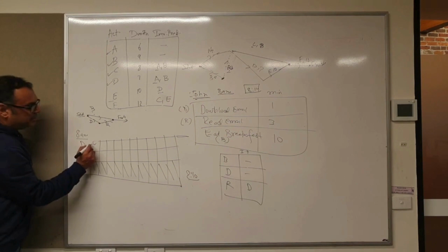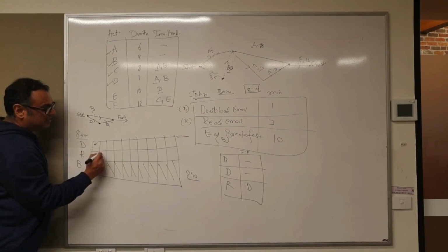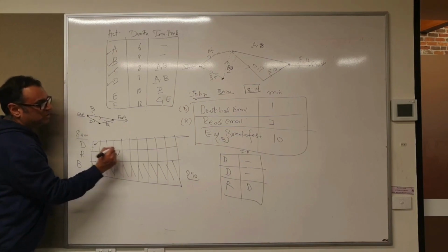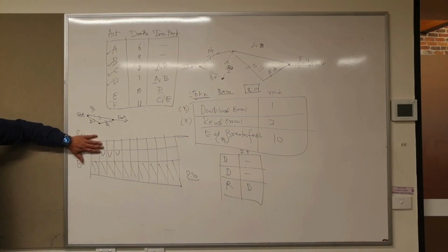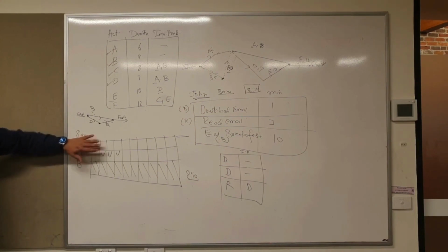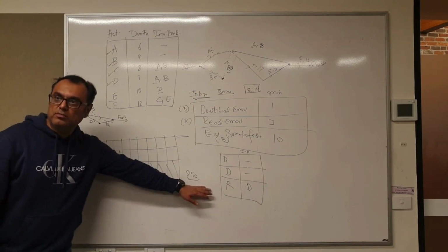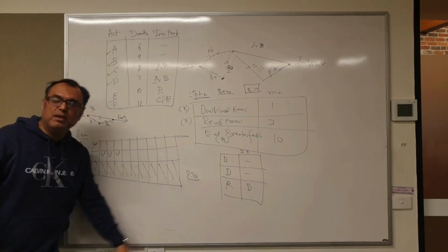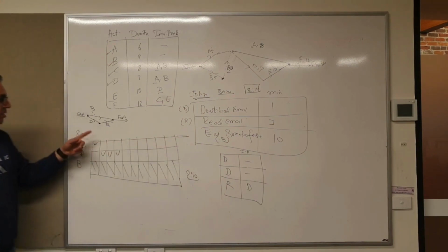Now, downloading can start the first minute. The moment downloading finishes, it takes another 3 minutes to read the email. Once he's done with these two activities, he still needs to finish his breakfast to go out of the door. So by what time will he go out the door? 8:10 and not 8:14 because of this.